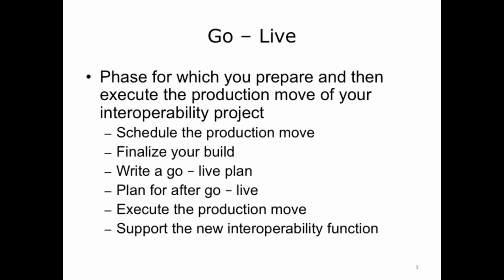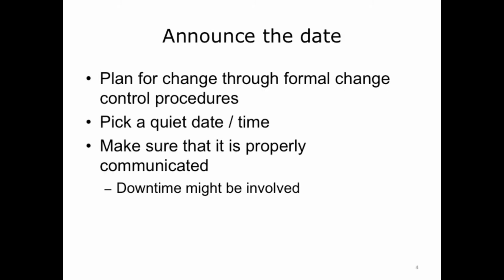It consists of scheduling the move, finalizing the build to be moved, writing a go-live plan, planning for after go-live, executing the production move, and initiating support for the new interoperability implementation. Whenever a change is made in an IT environment, it is important that the change is coordinated with all other changes and with business operations. That is why formal change control procedures need to be followed.